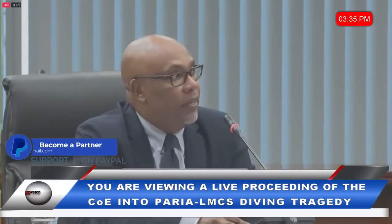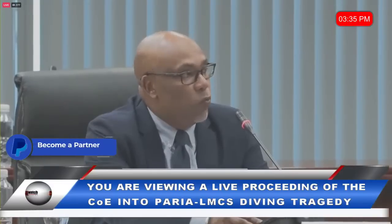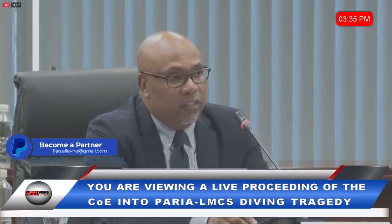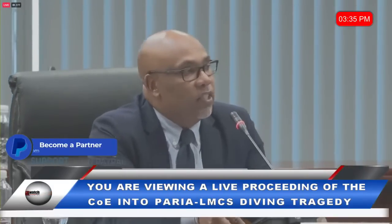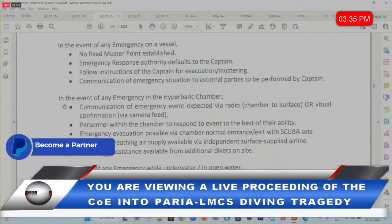Whilst we have this up here, I think we already established that Delta P was not identified in the risk assessment or hazard identification. Yes. Correct. And I offer you that an emergency response plan really comes out powerfully out of a quality risk assessment, yes? An emergency response plan would come out powerfully if a quality risk assessment was done. It speaks to the emergency response plan.